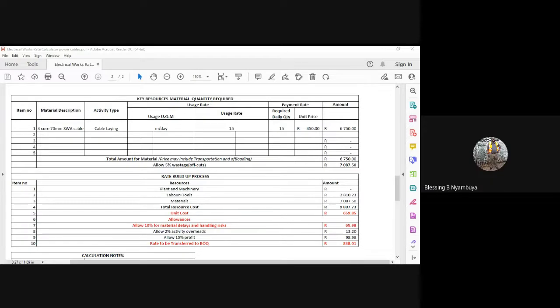Activities like cutting the cable, taking off the armoring, that can be done by the general labor. You don't want to waste resource where it's not needed, where you can sometimes leave general labor doing stuff that an assistant electrician should be doing, and the assistant electrician will go and attend to items that I'm trying to be specific.